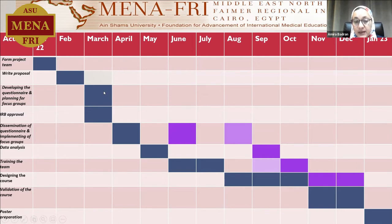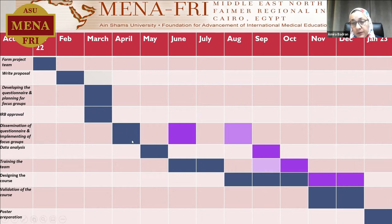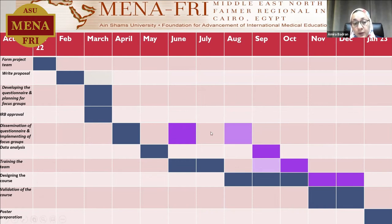The proposal was submitted to the ESCAL committee at the faculty and ethical approval was retrieved by April. It was planned that dissemination of the questionnaires and implementation of the focus groups would take place in April. However, this did not work exactly as planned. We had to postpone this step until June due to students being engaged in their coursework and assessments. The questionnaires for staff members were also postponed to August due to the course load for staff members who weren't able to participate before then.